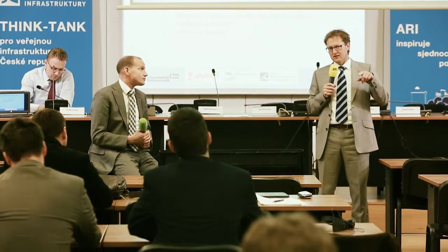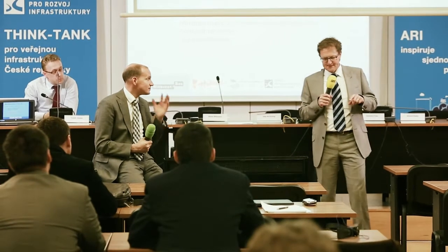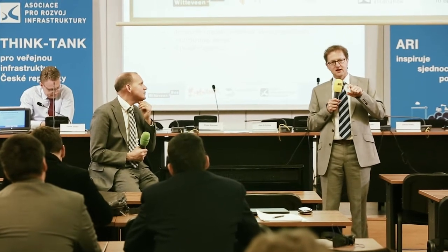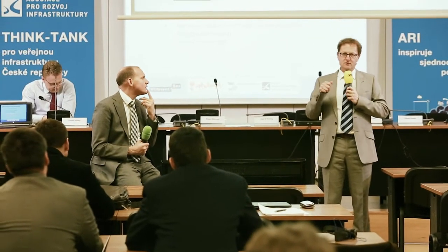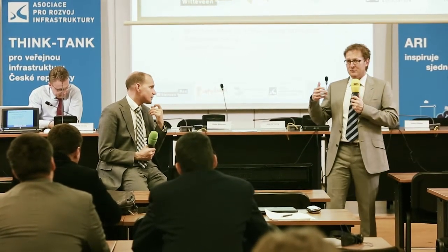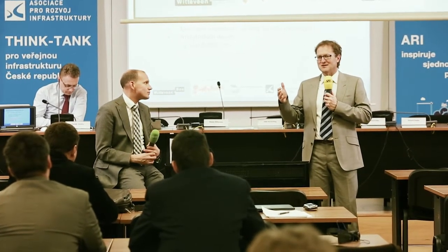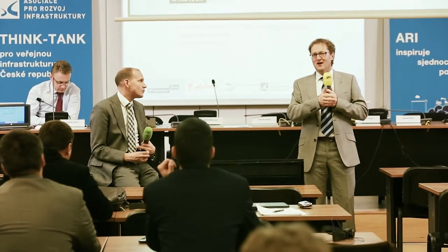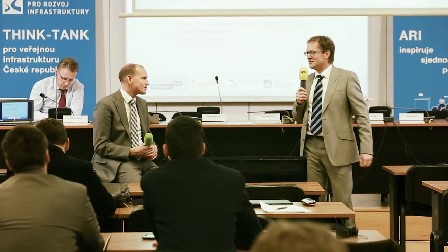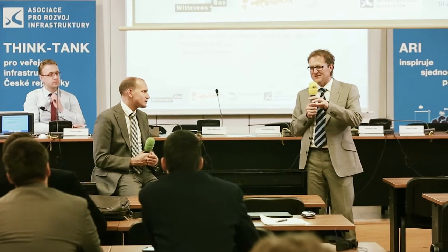Because there's one other element, and then I think we'll close. If you assess these elements, you have to be very aware of how you're assessing and what your assessors will do. Because if you score, for instance, from 1 to 10, then every assessor will be back in grammar school and will think, okay, a 10, I won't give anyone a 10 because that's perfect. I won't give anyone a 1 because that's too low. So everyone will score in the range of 4 to 8.